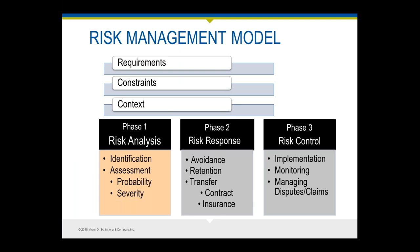It starts with the risk management model. This can apply to any undertaking you're about to do. It starts with what are the requirements — the program you're being asked about, constraints in terms of budget, schedule, and context such as legal, economic, and political factors. All of that has to go into the mix of inputs. Then when you get the inputs, you start doing the risk analysis part, identifying and assessing the probability and severity of the risk.